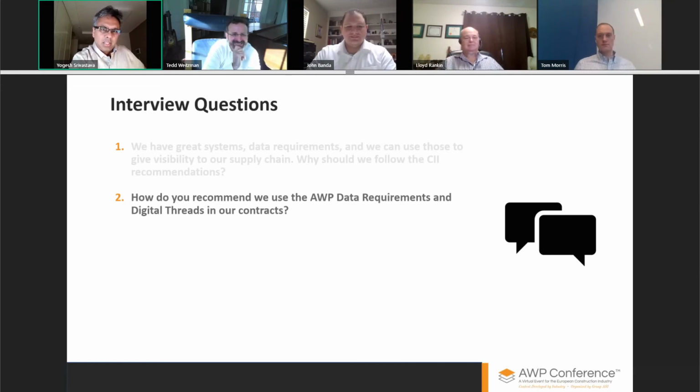Number one. And once you put it in the CDRL, please also specify whether you get it when everything is done or progressively as it goes. And the third part is, even if you've put it all in there and specified it, you do have to enforce the contract.